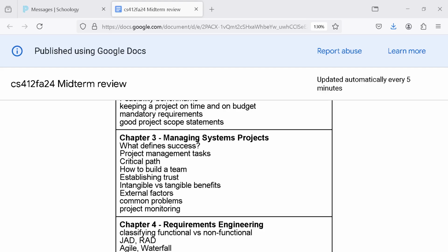If 3 things are in parallel, and 2 things that don't take very long adjust their delay a little bit, still the project will be delivered on time. They're not critical path. Anything whose time delay will delay the entire project is critical path. So all the things that take the longest before the next thing can happen, if there's other things that don't take as long, there's slack time in them, they're not critical path.